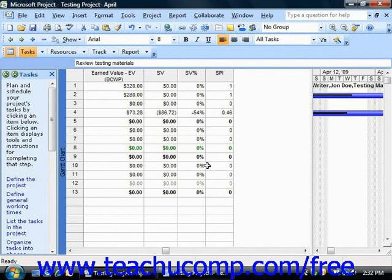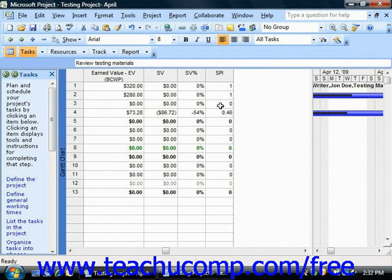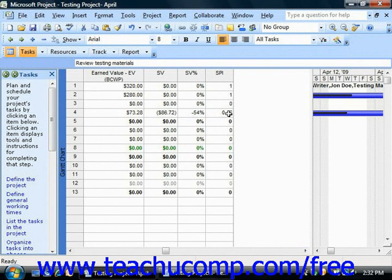That shows how far behind or above the task's baseline value you are — so you can see this task looks like it's a little bit behind. You also have the SPI, which is the Schedule Performance Index. That's an index value showing how many cents worth of actual work you're getting by the status date for every dollar that you plan to spend. For task 4, for every dollar spent there's only 46 cents of actual worth being accomplished.